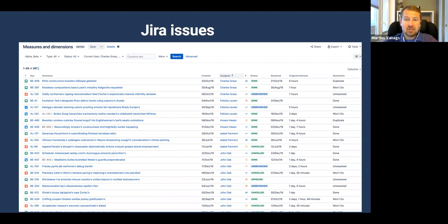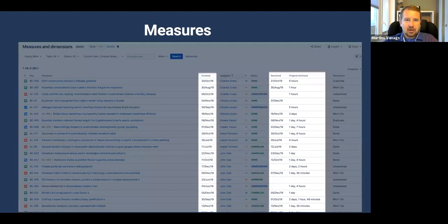And this is the star scheme. The numerical value is in the center. This is the basics of EazyBI when you create reports. All right. When we talk about Jira numerical fields, those would be automatically imported as numerical measures. Those can be measures like original estimated hours, number of resolved issue counts, number of created issue counts, number of hours logged. And these all are binding elements when you create reports.